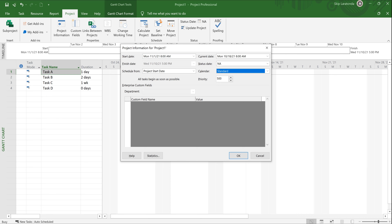If you have modifications to those hours, you can certainly do it — it's covered in a future lesson. The standard calendar is Monday through Friday, 8 o'clock in the morning to noon and 1 p.m. to 5 p.m.